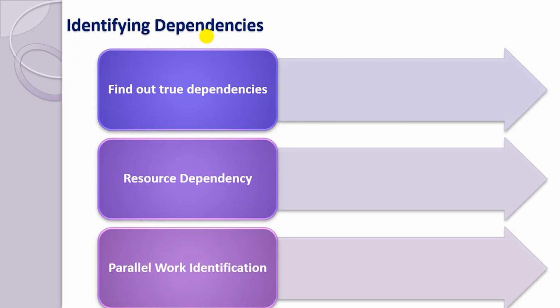Then as an expert project manager, the first thing you need to do is sit with the other project managers who have handled the project and understand the requirement, understand the client, and identify the dependencies. For example, I have taken over a project where there were 50 to 100 team members. It was an insurance product, and the first thing I did was identify the resource dependencies, who are my core team, so that when you don't have much knowledge about the project initially, you gain the knowledge from your team members, identify your core members and form a team.